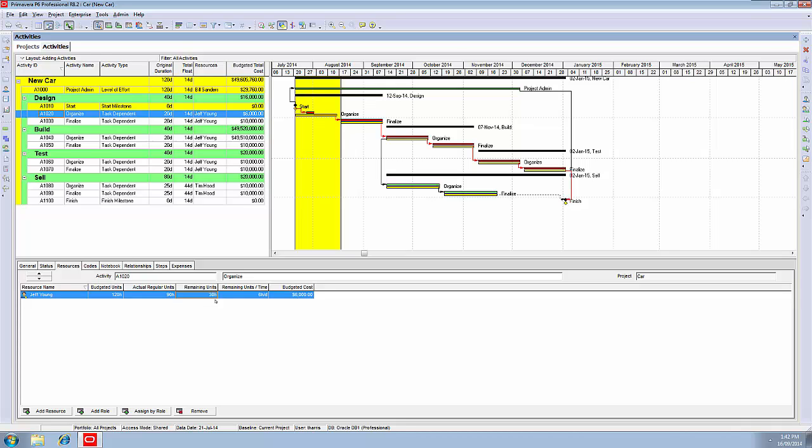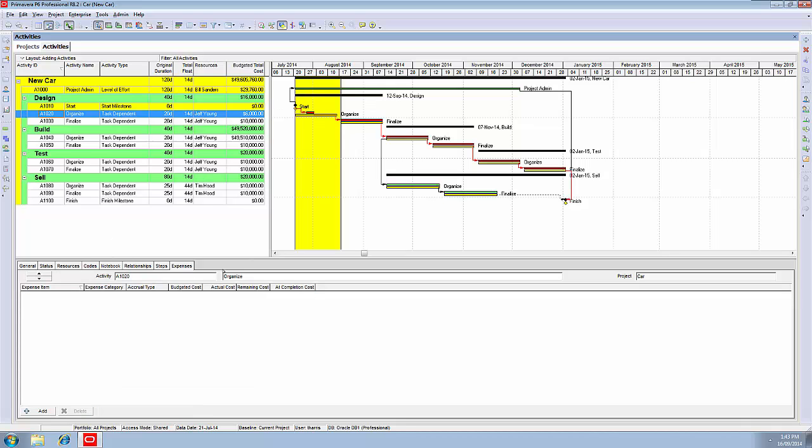It's assuming that there's 30 hours still remaining and anticipating that 90 have been done. It's almost six hours a day, so there's a little problem there that we'll have to sort out later on. But at six hours a day, that is correct. We don't need to make any changes there. Expenses - there are no expenses on this one. That's it for this one. There is no work done on the rest. That's the end of the update as far as we're concerned in this first month.